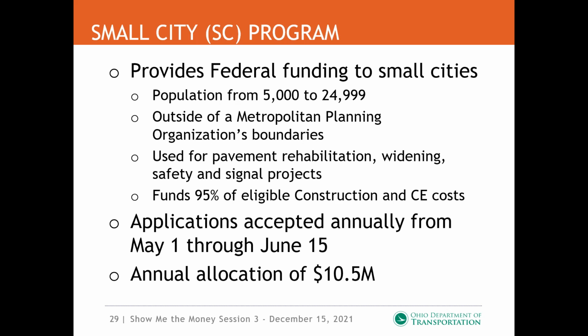Again, this program is utilizing toll revenue credit. So we are funding construction and construction engineering at 95%. And then the local, as with the other programs, is responsible for your upfront costs such as design, environmental, right-of-way, that 5% match, and then anything over the construction cap.